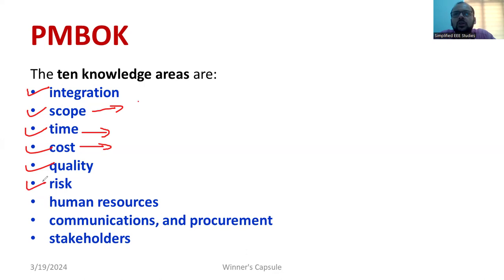Also, risk is most important. Because of COVID-19, many project managers had initiated projects in 2020, and so many projects were delayed. It is an external factor, not in our hands, correct? And cyclones, floods, etc. Those are risks, and we need to think about how we are managing them. Also, we have to maintain a buffer time. Suppose before delivering, we should keep a buffer of at least 5 or 10 days.